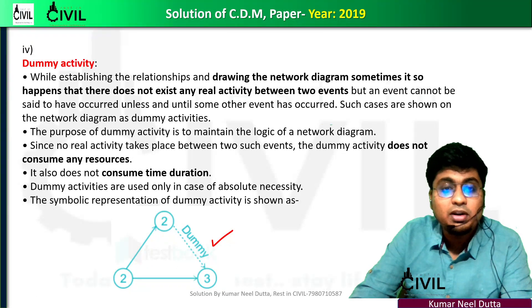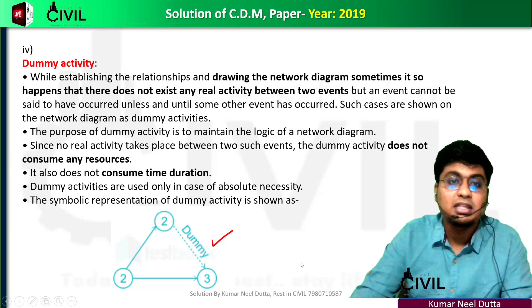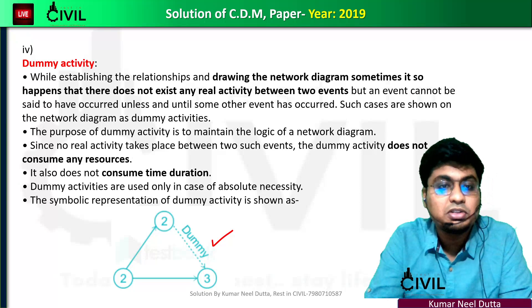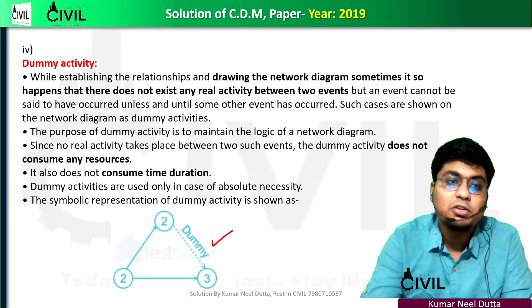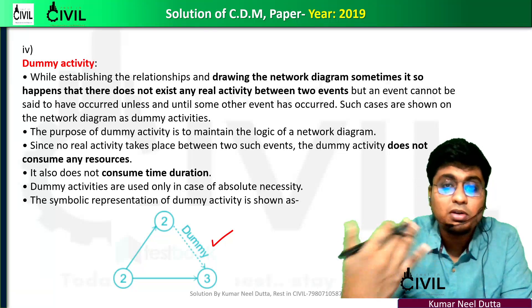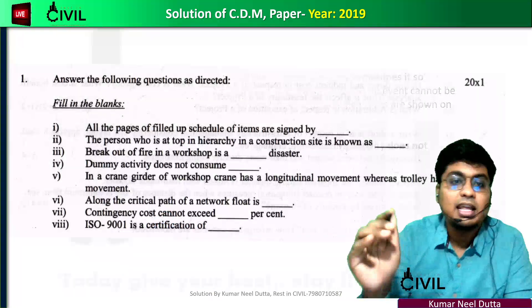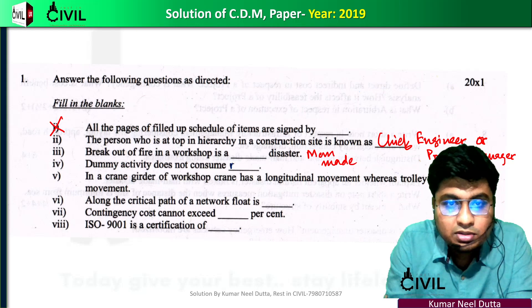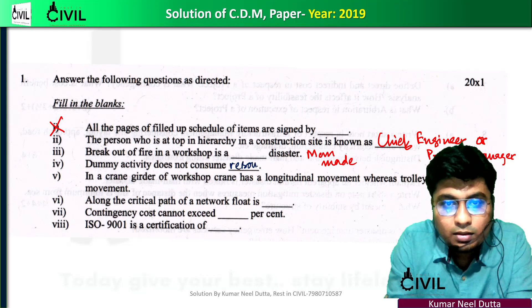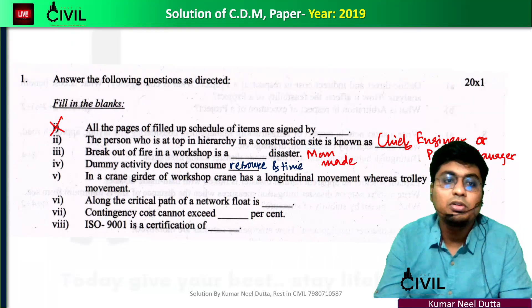To summarize: a dummy activity does not consume resources or time. This is a key point — resource and time are both not consumed by a dummy activity. This is an important concept for your exam.